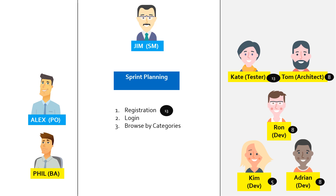In our story, once Alex and Phil completed the walkthrough for registration, the team started estimating. The estimates provided varied from 5 to 13. The team discussed among themselves and came to a common agreement on story points. Kate informed that there are many devices on which she needs to test, and hence they agreed to go with her estimate.